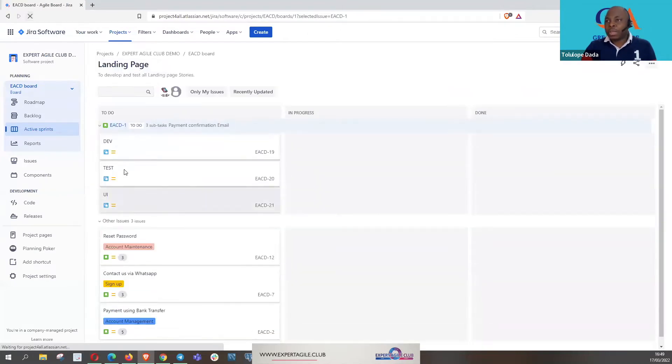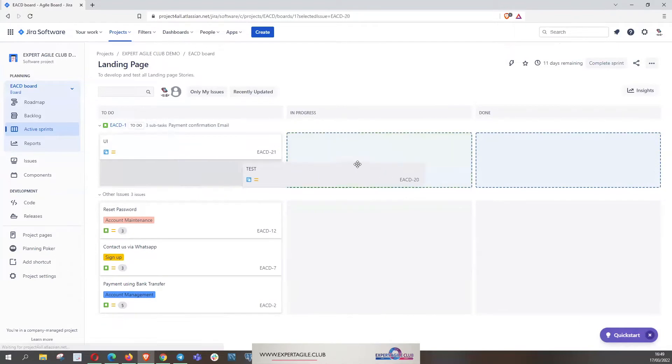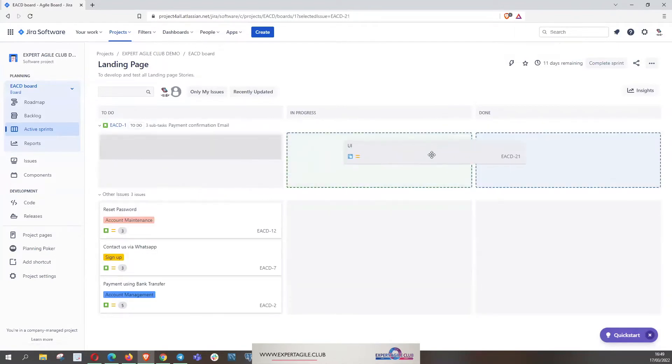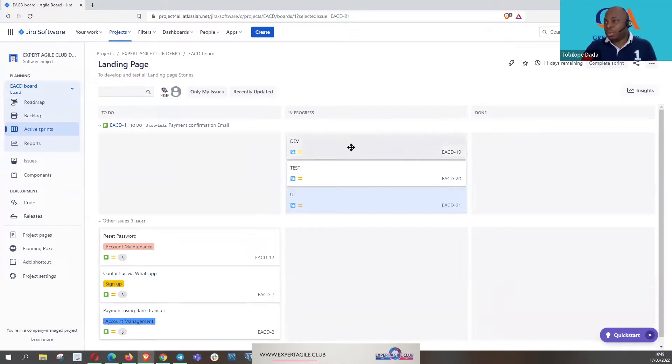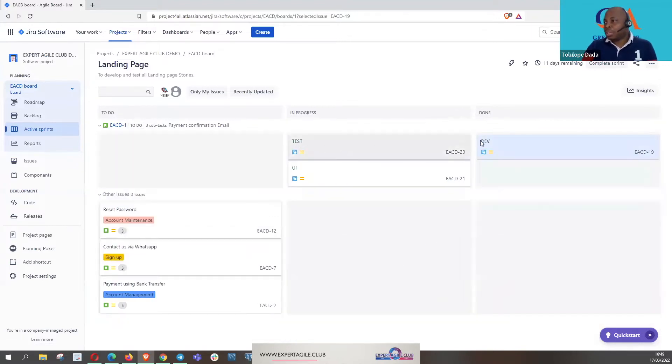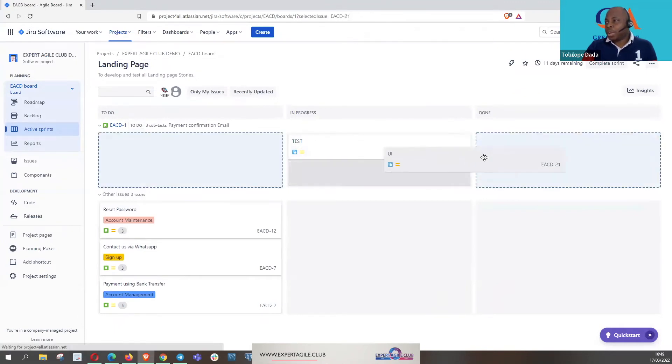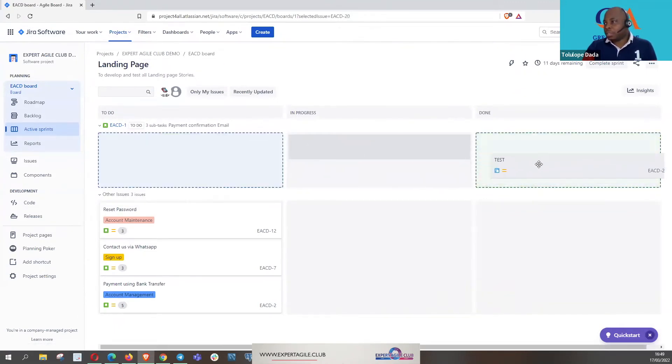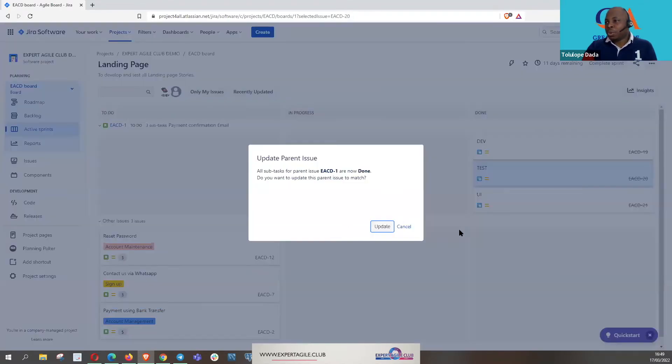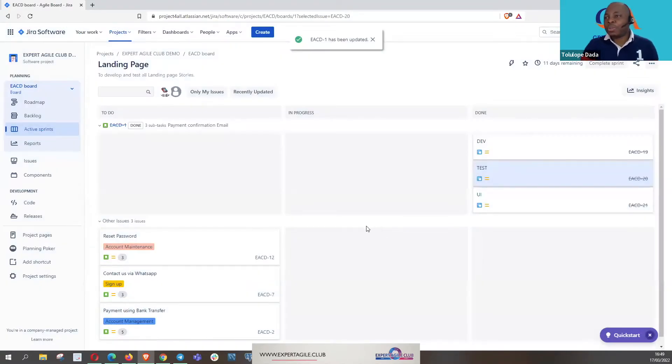So these are the subtasks that are created, those are the items that will now continue to move in progress. There's a way that we can customize this board but that's not part of the topic today. And then when all of them are done, the developer has developed, the UX has done UX, and the tester has tested, then the story can now be updated and be closed. So we are going to leave Jira.